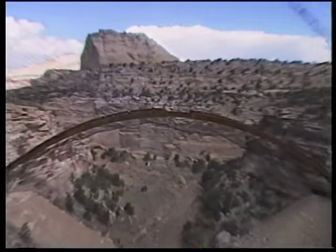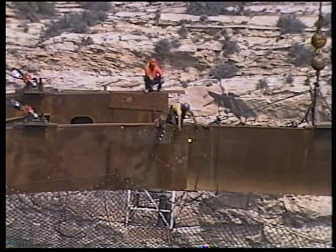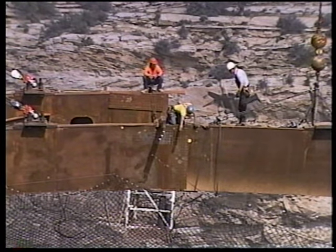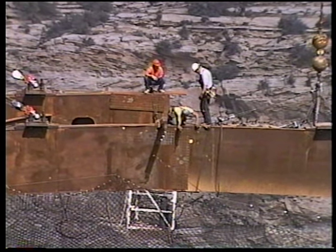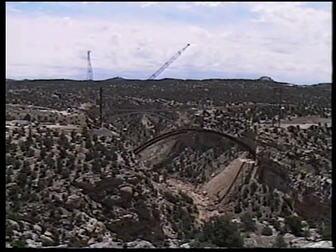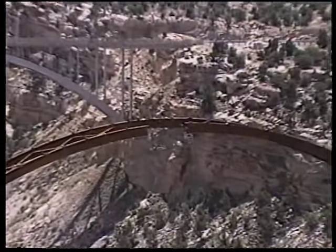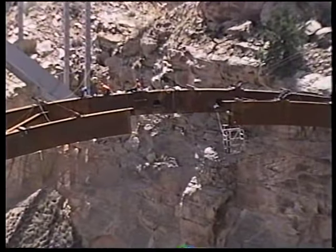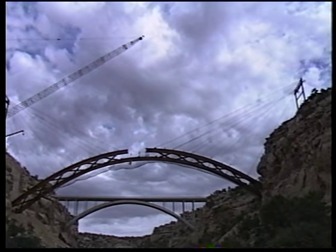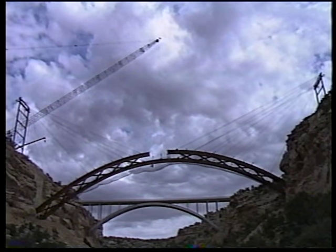In placing the final sections in the arch, the towers were luffed back to open the center gap wider. With the center sections in place, the towers were luffed forward to relax all the forestays, and the arch joints closed tight, making a perfect fit. One secret to making this method practical was Jake's ability to separately retension every individual fore and backstay line, adjusting tensions according to a pre-engineered plan. All calculations proved accurate. The arches and superstructure were completed ahead of schedule. This phase of the project came in under budget, and best of all, there were no lost time accidents.